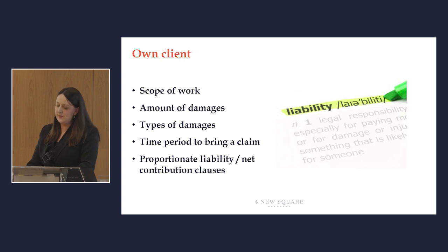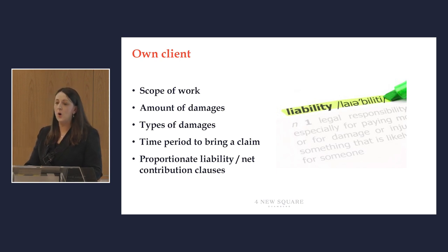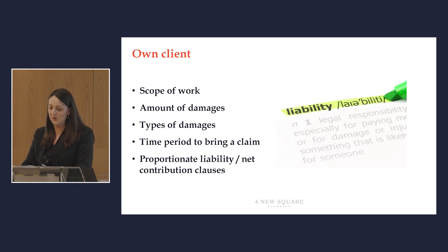Third, types of damages clauses seek to exclude liability for specific types of losses. In the professional services context these typically tend to be exclusions for matters such as consequential losses, loss of profits or anticipated profits. Consequential losses mean any loss which is not directly caused by the breach, arising from a claimant's particular circumstances which the parties knew or should have known about when the contract was entered into. The trouble with this type of clause in the professional liability context is that professionals are particularly prone to causing exactly this type of loss, begging the question of whether excluding this type of damage could ever be said to be reasonable.